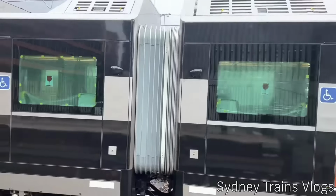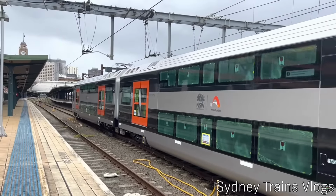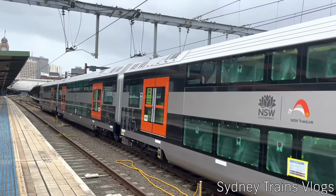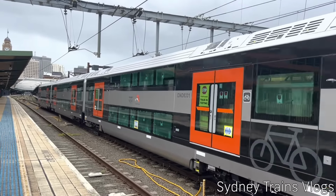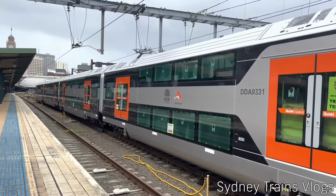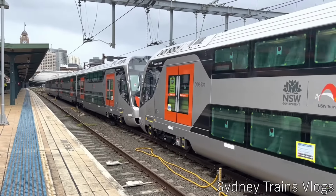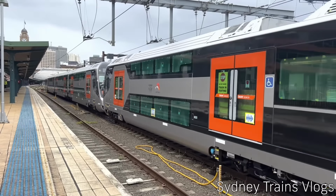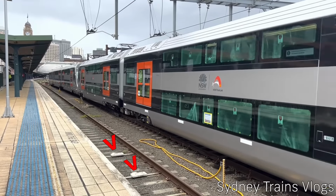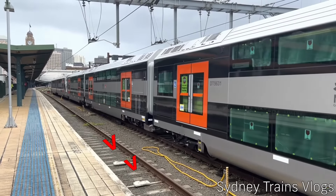Issues emerged with the CCTV cameras during testing, becoming a central part of the RTBU's push. Eventually, the New South Wales government buckled and agreed to changes to bring the new fleet into line with a Waratah-style operating model. These included removing crew doors from the interlock circuit and repositioning door controls and CCTV monitors to a guard workstation. Other changes had to be made at short platforms, as stopping points had to be moved and balises, electronic beacons mounted in the four-foot on sleepers, reprogrammed.